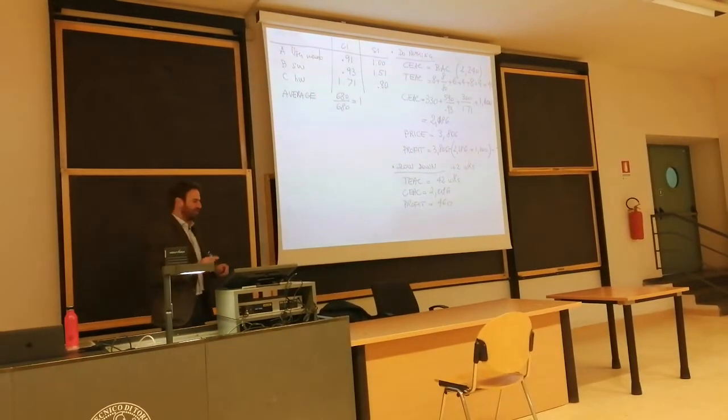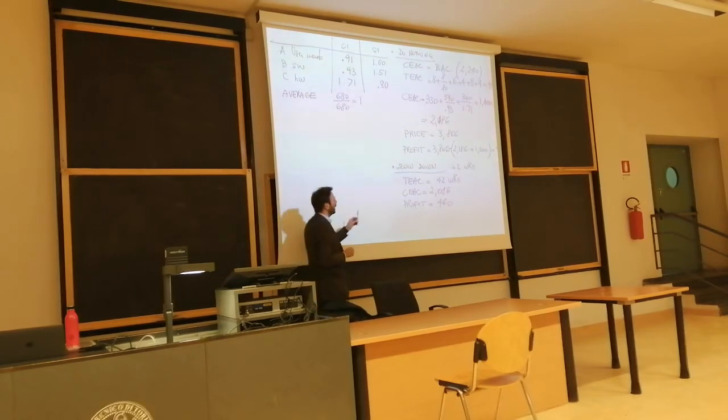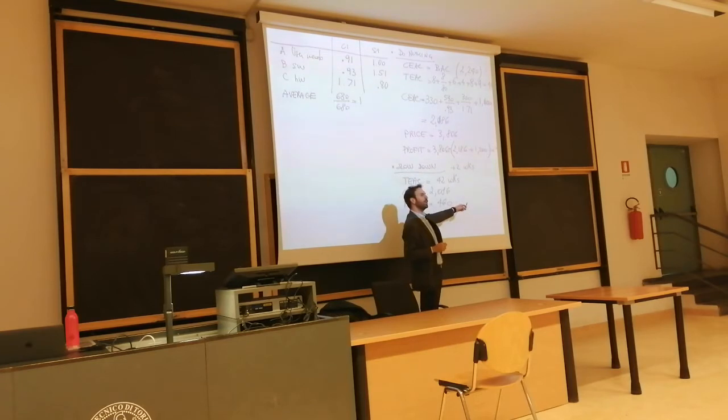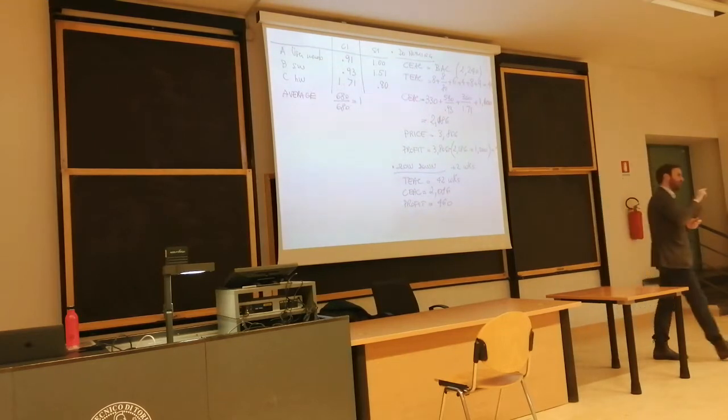So the solution is to slow down F and not to crash. Overhead cost, we can save 100,000, but we incur 60,000 more of overhead. So we raise profit by 40,000, 20 a week.